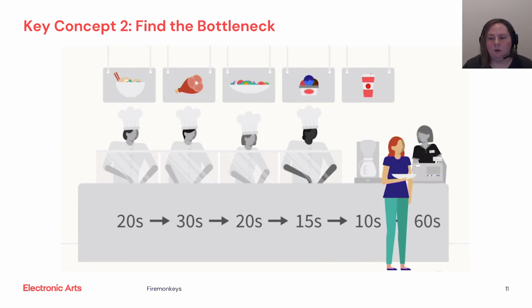I explained the situation to the team, and we immediately stopped work on any part of the pipeline that did not involve enabling animation. First, we spent a whole sprint with the single goal of unblocking animation. This allowed animation to begin work earlier than the pipeline dependencies would normally allow. Next, we listed all of the required animations and prioritized which ones were high impact and therefore high priority to become bespoke animations, and which ones we could consolidate down to reusable, looped animations with a mood.